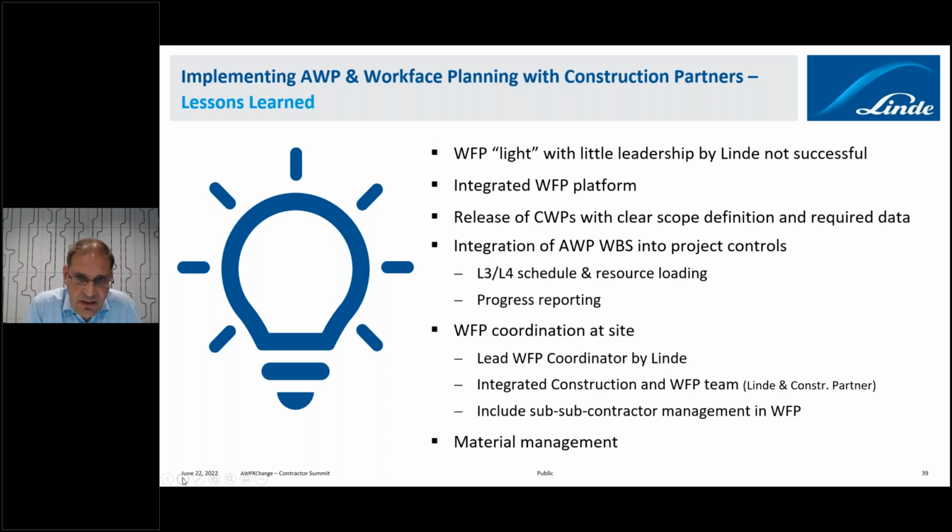Key is really the integrated workplace planning software platform, so that the construction partners and Linde work in the same software environment, use the same tool to have one truth. So this is very much key. It's about this release process of CWPs, so that we just don't throw bits and pieces over the fence, that we really release holistic CWPs to our construction partners.